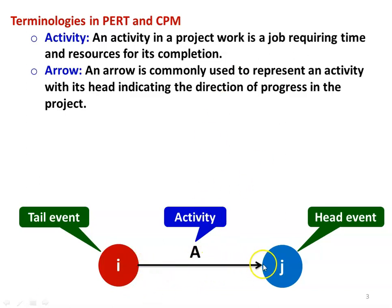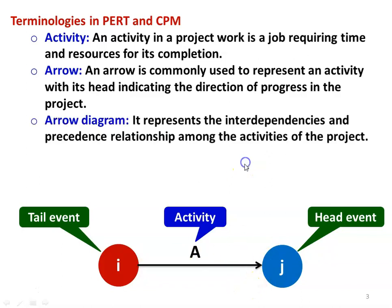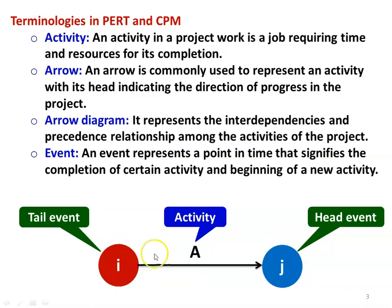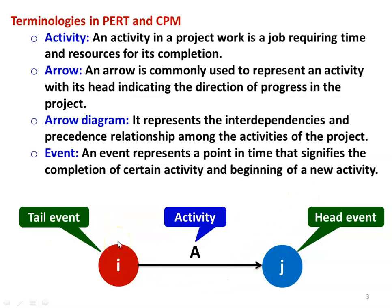There are two events, I and J. I is known as the tail event and J is known as the head event, and this is the direction of progress of the particular activity. Hundreds of activities are connected to complete the entire project work, represented by an arrow diagram. An event represents the point in time that signifies the completion of one activity and the beginning of a new activity. I is the beginning and J is the completion of activity A, from which further activities proceed.